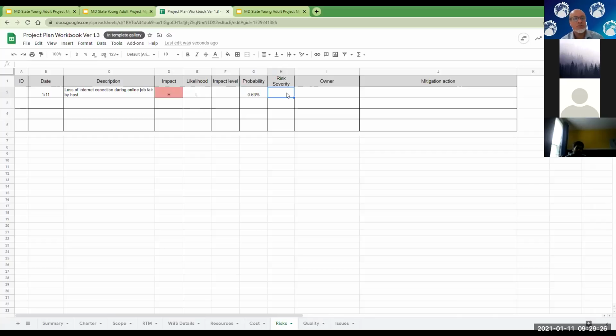The way to calculate the probability is the number of times something happens over a duration of time. In this case, we're talking about loss of internet. We can hypothetically pick half a year, 6 months, as the period of time, or a month. Let's keep it simple, 30 days, a month. How many times does Alexis lose internet per month over the past 6 months? If her answer is once a month, then it would be 1 divided by 30 days. So 1 divided by 30, right?